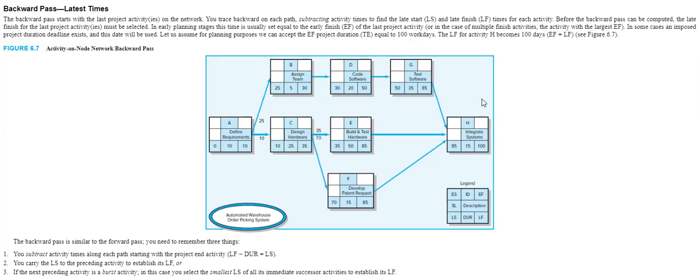You start at the very end of the project, in this case it's duration of 100, and then you subtract and go backwards. 100, and the duration of H is 15, so 100 minus 15 is 85. All right, just like the forward pass, when you have activities from one node going to multiple nodes, the duration carries over.